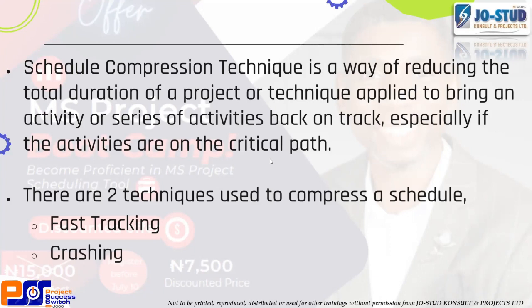The first thing you should do when you have that kind of case is to check if this activity has lost track because of a risk like rainfall, or a rework that you didn't envisage, or the client coming to tell you. I gave an example last week when I was managing the project. The man was building a 3-bedroom flat, and the family was supposed to arrive from UK for Christmas in the 2nd week of December, only for him to say the date has changed. They are now arriving 1st or something of December. I can't remember. And the project was compressed by 3 weeks.